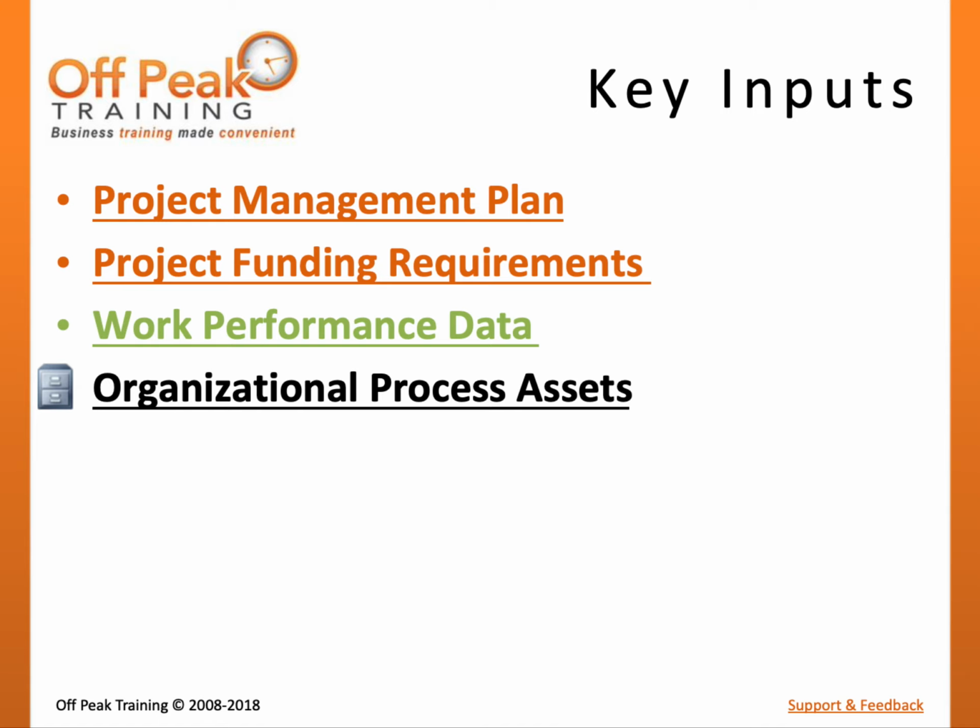The project funding requirements include the cost baseline as well as an additional layer of management reserves. If unidentified risks occur and impact cost performance, the project management team may make a formal request to have the management reserves added to the baseline.